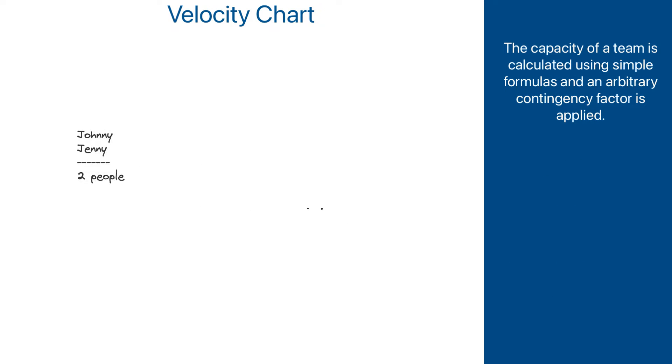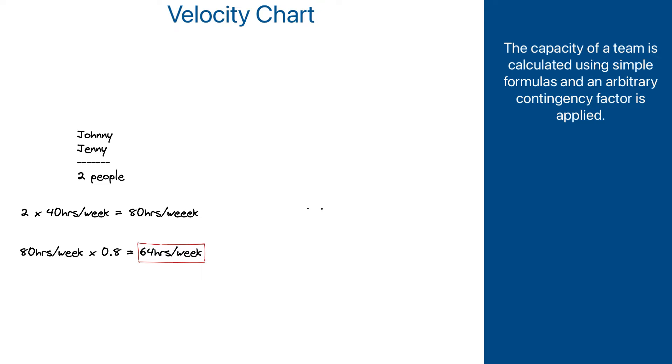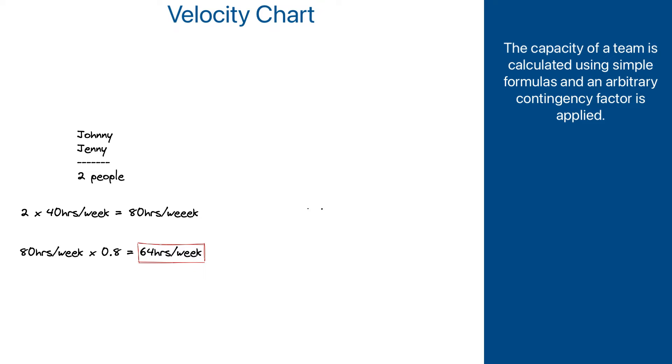Traditionally, it would be calculated by adding together the number of people in a team, multiplying it by 40 hours in a week, and applying some contingency factor, like 75%, or 80%, or 90%, to support the assumption that people are never 100% focused on the project work. That would tell how many hours of efficient work the team can do in a week.